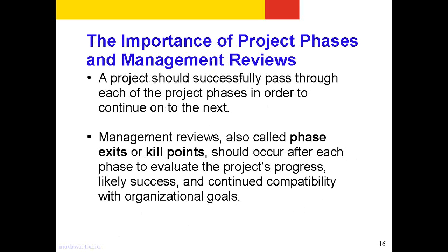Okay, the importance of the project phases and the management reviews. A project should successfully pass through each of the project phases in order to continue on to the next, but that's obvious. Management reviews, also called phase exits or kill points, should occur after each phase to evaluate the project's progress, likely success, and the continued compatibility with organizational goals. This is something that management will look into.